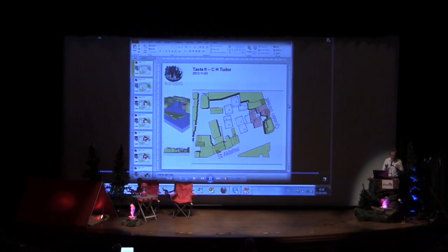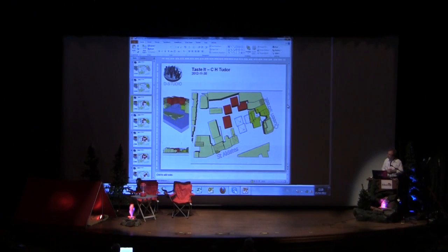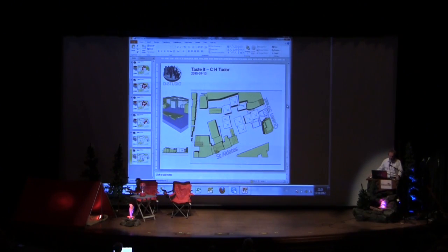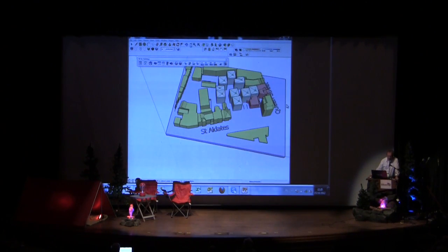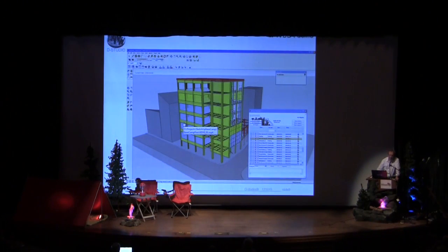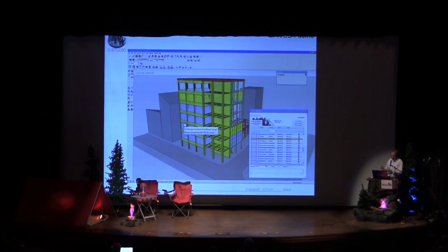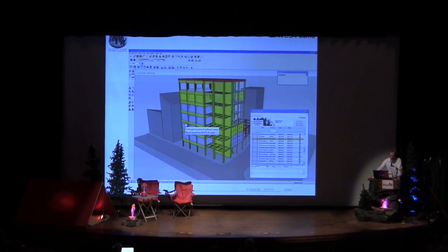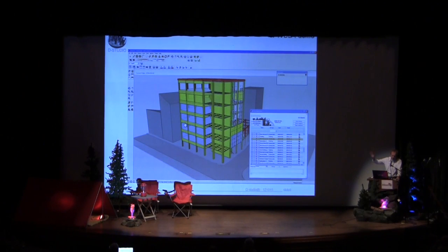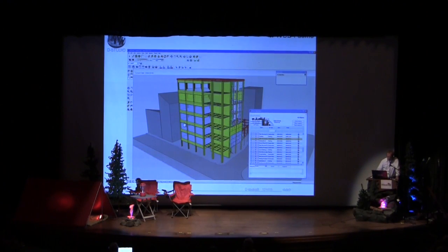Of course, here I've got a small cut in the movie. It's about a minute for this project, and even less. If you've got a bigger project, it can take up to 10 minutes, a quarter of an hour, something like that. But it's automatic. The advantage of having this PowerPoint report is that it's accurate with the planning and accurate with the model. If there is a problem, you can see it. It's not something which has been manually drawn, modified or interpreted. If there is a change or a modification, you just change the planning and a quarter of an hour later you've got a new schedule, a new report.